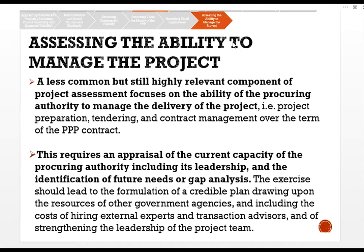Assessing the ability to manage the project: a less prominent but still highly relevant component of project appraisal focuses on the ability of the procuring authority to manage the delivery of the project — that is, project preparation, tendering, and contract management over the term of the PPP contract. This requires an appraisal of the current capacity of the procuring authority, including its leadership and the identification of future needs or gap analysis. The exercise should lead to the formulation of a credible plan drawing upon the resources of other government agencies, including the cost of hiring external experts and transaction advisors, and of strengthening the leadership of the project team.